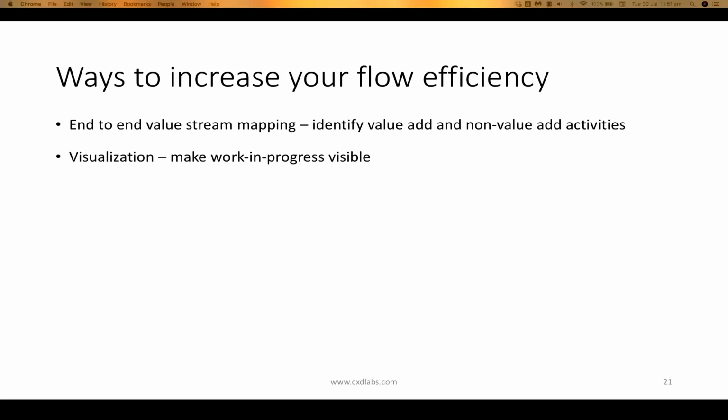Next, you've got the visualization methods. So you can track the work in progress. You saw before we had the Kanban. You can use that visualization against the value stream to understand where the work is piling up, where the work in progress is, and where the bottlenecks are. And that comes to my next point. Identify where your constraints are, where the bottlenecks are. And there's always going to be one bottleneck which is the tightest.